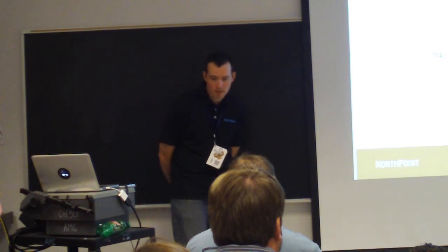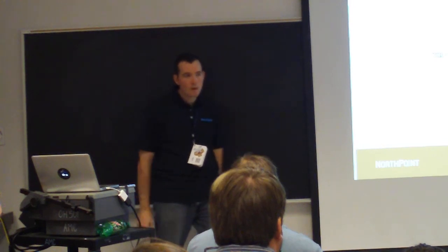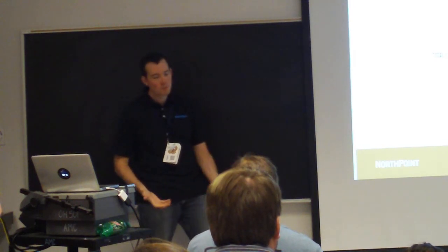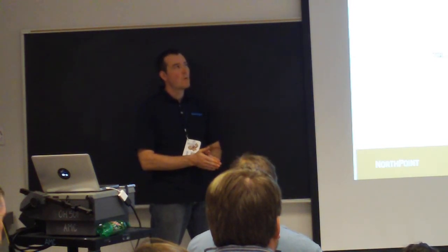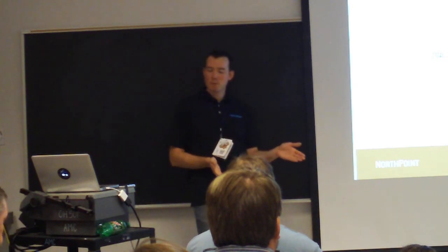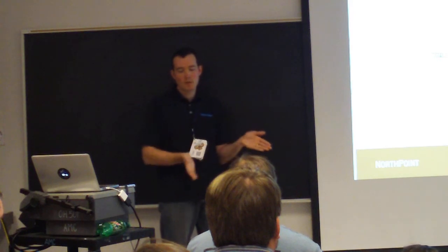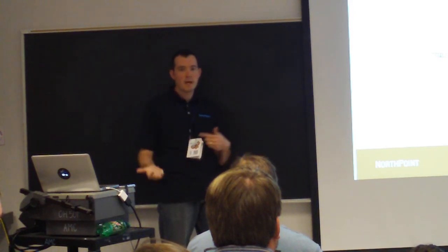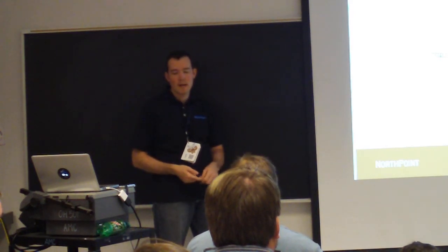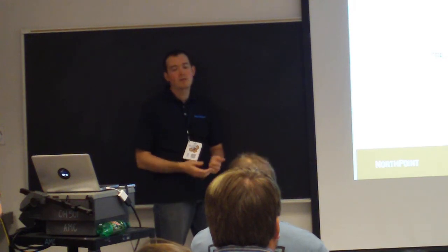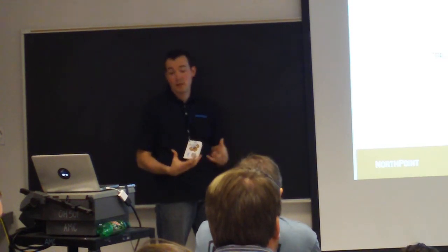Hey, man, do you guys also do waterfall? Well, I do as a PM. We don't traditionally do waterfall. If it's a 4-week project, it can kind of be a waterfall because we need to get all the requirements done anyway. But primarily we're dealing with agile. We're creating user stories, and we're creating tasks off those stories for the development team.